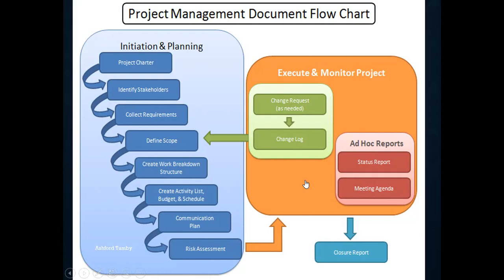What is the process that your company presently uses, right? Do they have a change request? Do they have a log? So something very simple that I initiated: when you have changes occurring with a project, you just do something which is known as a change request. So you send in: this is the activity, this is the change that you want to do, this is the risks associated with it, right? And there's a whole table for it. And then you also have the reasons behind it.